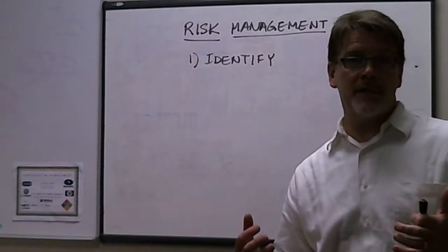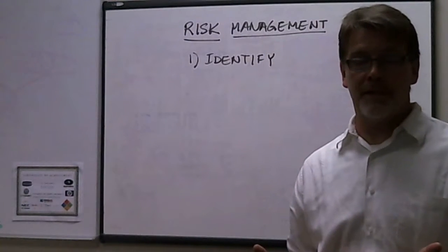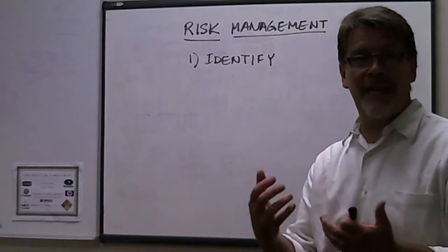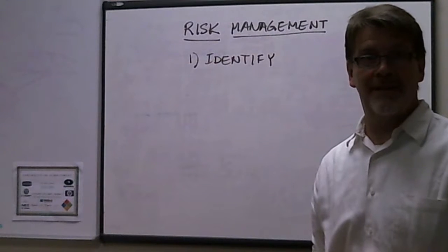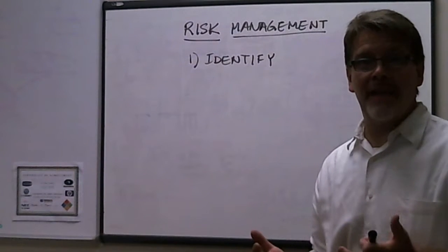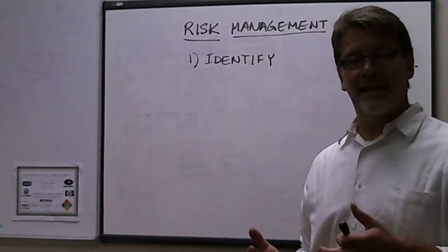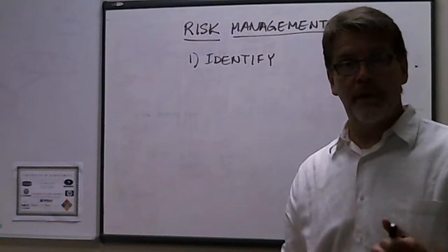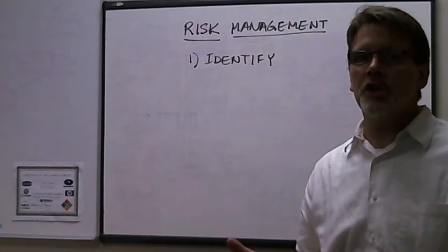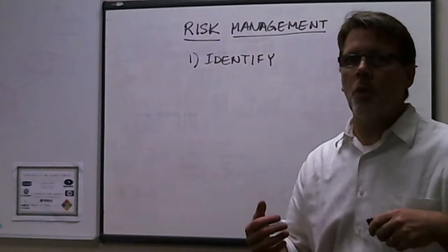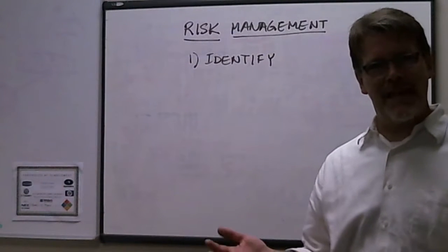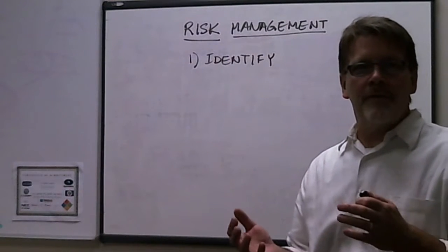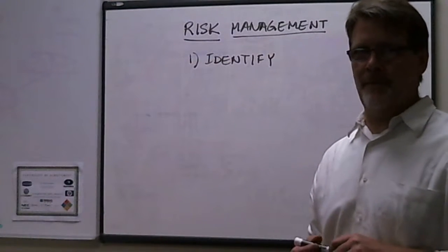And when we want to do that redistribution, what do we want to do? Well, when you receive the categorization of the risks that you've listed, we really haven't done anything other than identify risks and categorize them. So the next thing we need the teams to do is each person needs to look at that risk and weigh that risk. We need to assess that risk and get an idea of likely what that impact might be to the project.